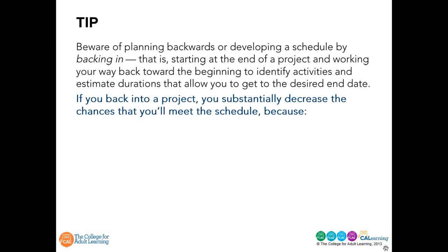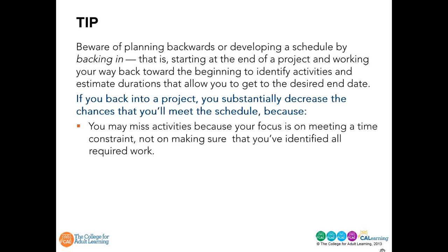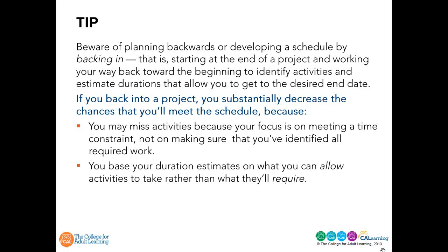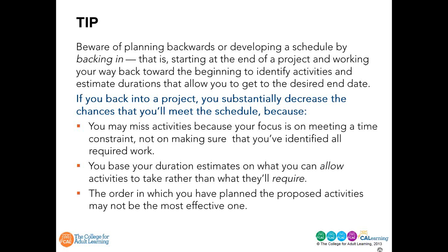If you back into a project, you substantially decrease the chances that you'll actually meet your schedule, because you may miss activities because your focus is on meeting a time constraint, not on making sure that you've identified all the required work. You base duration estimates on what you can allow activities to take rather than what they'll require. The order in which you've planned the proposed activities may not be the most effective one.